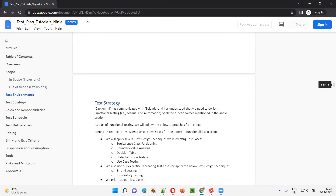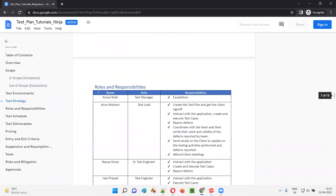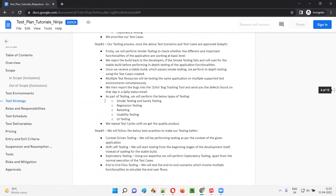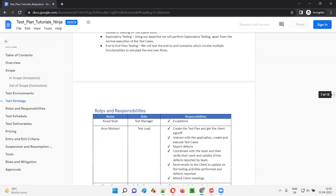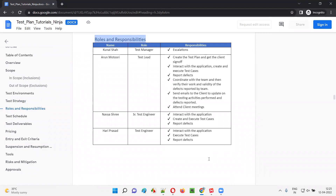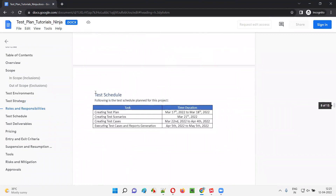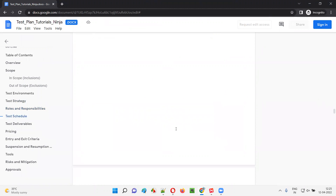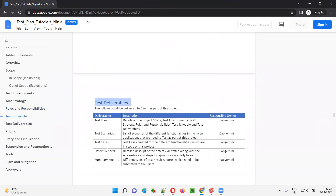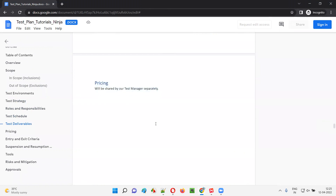Then we have test strategy — the strategy you are going to follow for testing. After test strategy, you have roles and responsibilities — different people and what are their roles and responsibilities in the project. Then we have the schedule — at what time we are going to do what. Then we have test deliverables — what are the different things that we are going to deliver as part of this project. Then we have pricing, which is optional.